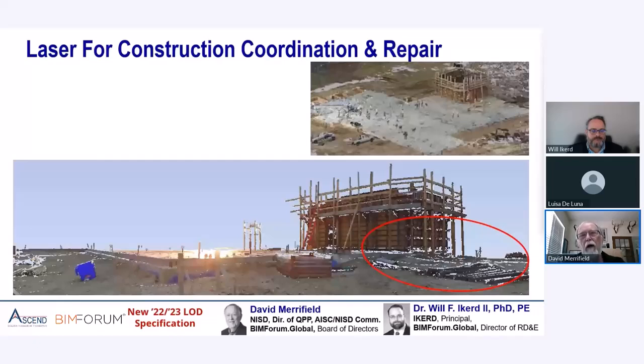It took about 3 days, I think, over a weekend to accomplish this and then get the project back on track. And we simply sat down with the contractor, the concrete sub, the erector, and the owner, and went through each location and made decisions about what needed to happen at each location. And in about a half day's time, we had reached solutions and were able to get the project back on schedule.